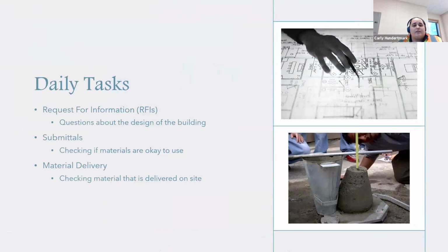And so that brings me to some of my daily tasks for the day. Being a project engineer, I don't actually design anything. I help make sure that the subcontractors, the people building the buildings, have enough information so that they can build, and that the materials they use are up to par per the designer's expectations and requirements. So I deal a lot with requests for information, or what we call RFIs.